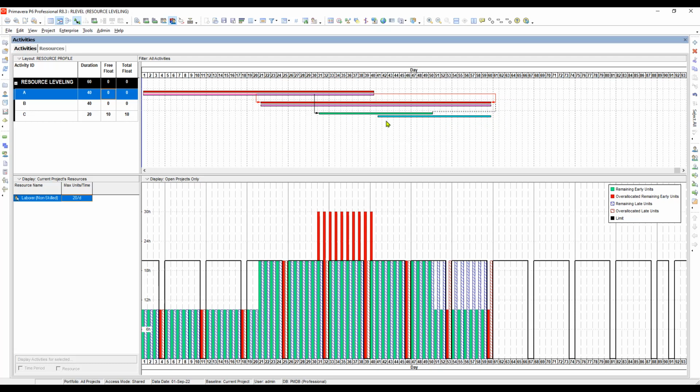So if we move this activity down here, to finish after the finish of this activity, the relationship of this activity with this activity is a start to start 30 days. So how about if we move this activity in here, and this finish date will move in here to be parallel to its late dates. The completion date will not be affected, right?